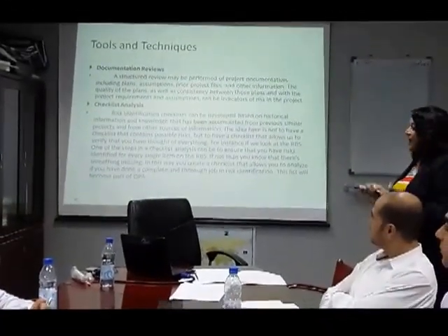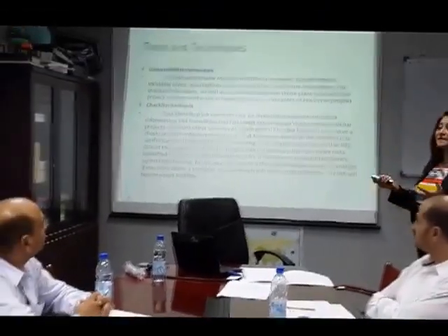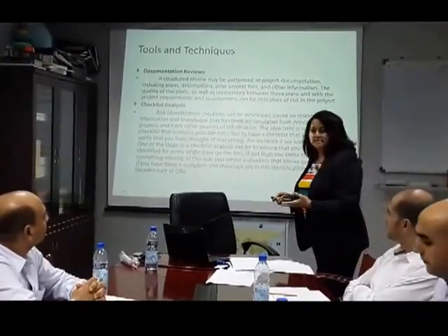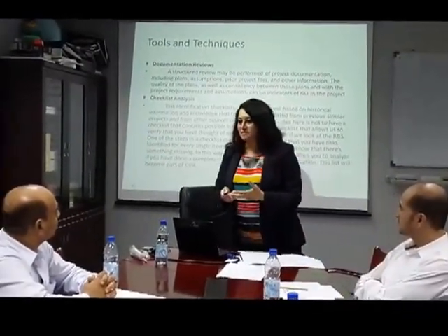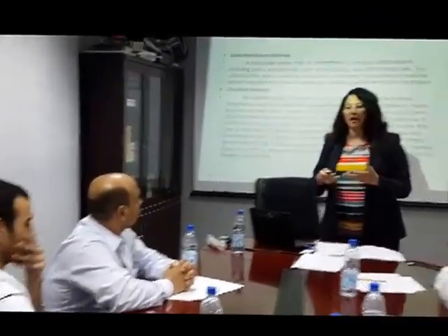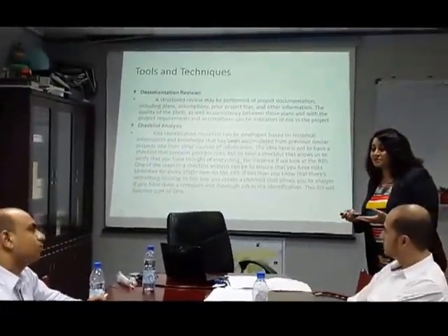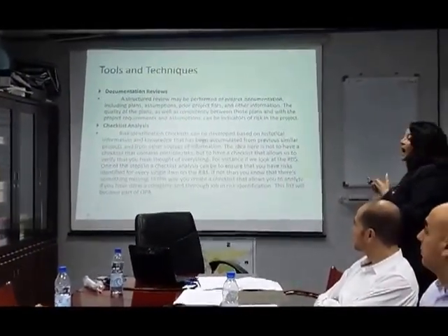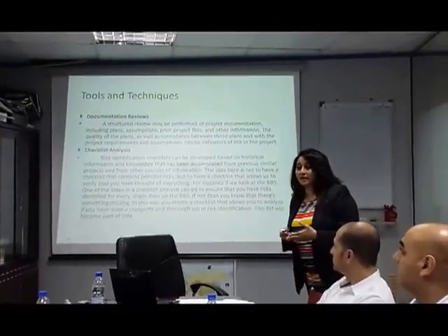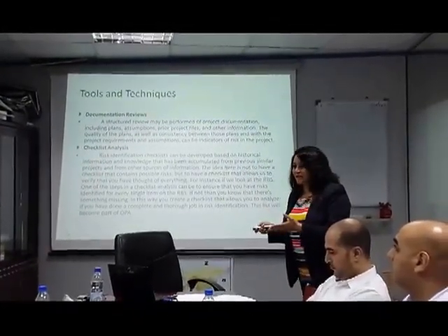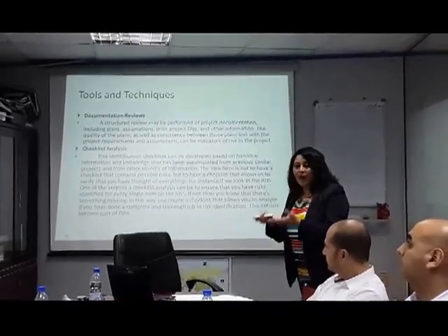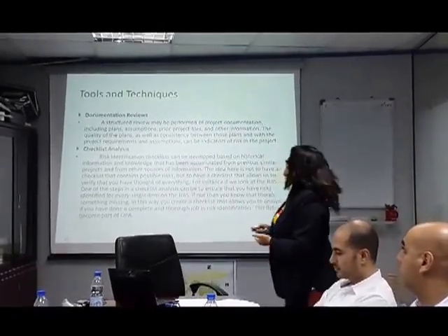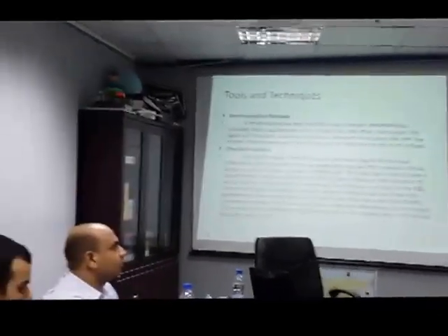documentation reviews. I have to review all these documents. What does it mean to review the documents? First of all, I look at the content. I see, is everything that is written there correct? Is it accurate? And then I also have to see, are the assumptions correct, or do they need to be reviewed? I look at the quality of the presentation and format. Do I have extra details that are not needed, or did I miss out on details? So all these have to be looked at again.